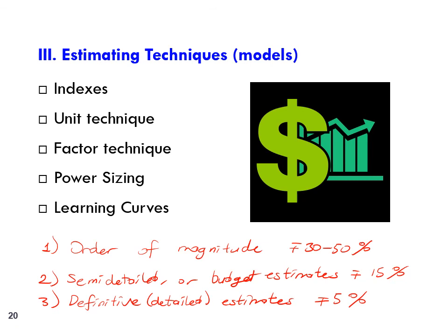Of course, in order to use estimation techniques, we need some data. And what are the sources of this data in a company? The most important source of data is the accounting records. These are the prime source of information for economic analysis. The second source can be other sources inside the firm, for example, the engineering, sales, production, quality, and purchasing departments, and so on.